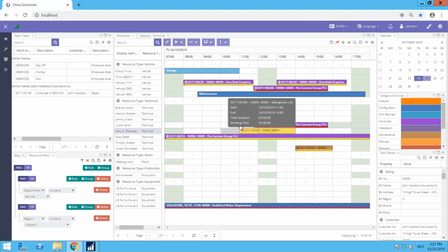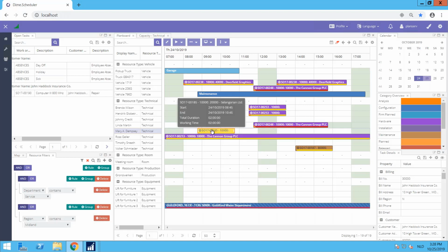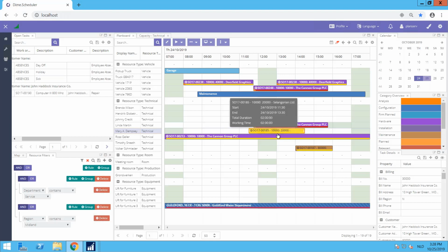You can see the auto extension. Let me show that a little bit clearer here. So I now have a duration of 2 hours, from 8:45 to 11:15. I can push it out until noon and it will not change. But if I would plan it over noon, you will see that the block auto extends with an hour, where now my working time is still 2 hours, but the duration is 3 hours because it's adding the whole lunch break time, which is a nice to have if this is something that you want to respect for your employees.